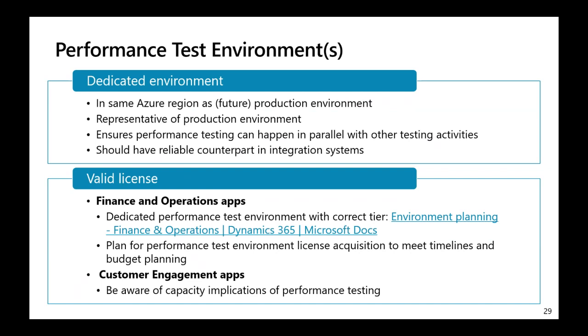A dedicated performance test environment is generally recommended for two main reasons. First of all, performance test results are meaningful only if testers are aware of the activities occurring on the system during the test, right? A performance test is worthless if an unexpected process suddenly places additional demand on the system during the test execution.